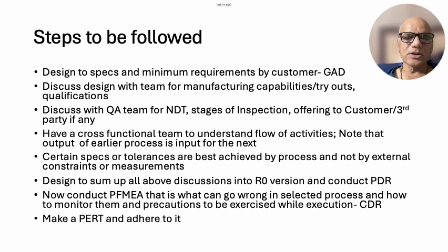Now we have not discussed that the output of the previous activities is going to be the input for the subsequent activities, and this internal customer relationship, a supplier and a customer, is going to exist between the processes which are properly sequenced. Therefore there has to be a handshake between the two boxes or the two consecutive processes, and only then will we be able to really meet the tolerances.